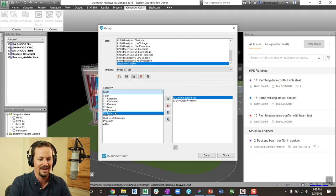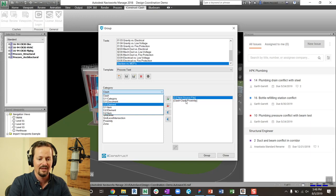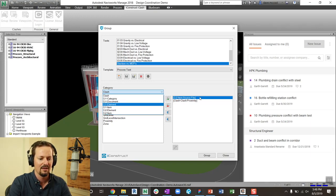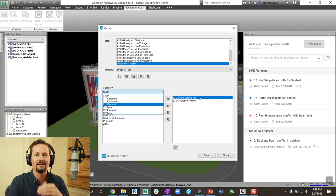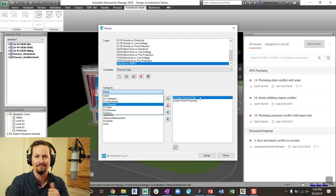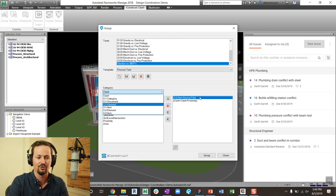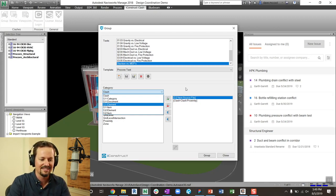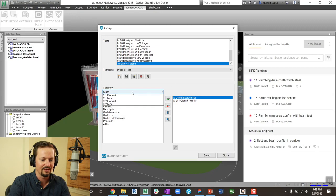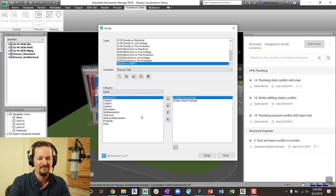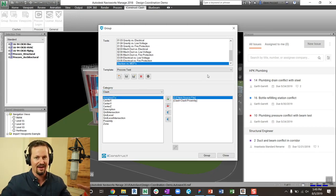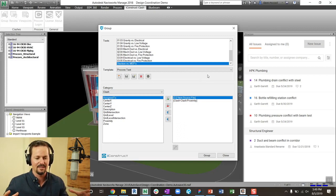I can group them by the elements. So what I did is I took the name, the source file name, as the first thing I want to group it by, because I want the clash groups to be sorted out by HVAC, piping, and electrical. And then the second thing I did is I used the clash and used proximity and did it about five feet. So anything within a five foot radius is going to be grouped in that as well.